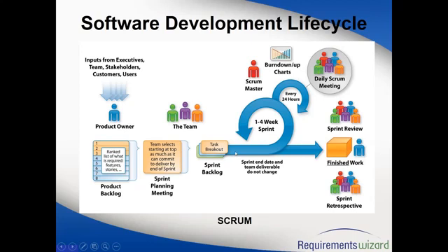No, every sprint will have its own review meeting. But let's suppose you did a 2 week sprint. At the end of the second week, your product owner starts playing with the system and tells you, like the login and ID, I need some changes. Right now we don't show the reset password link. We need that as well. So you will say, okay, let's take the requirements and put them in the backlog, and whenever we get to the point, we'll do it. It will go to the product backlog, right? Yeah, any new requirement will go to the backlog by default. Okay, so the product backlog is our requirements repository. Yes.